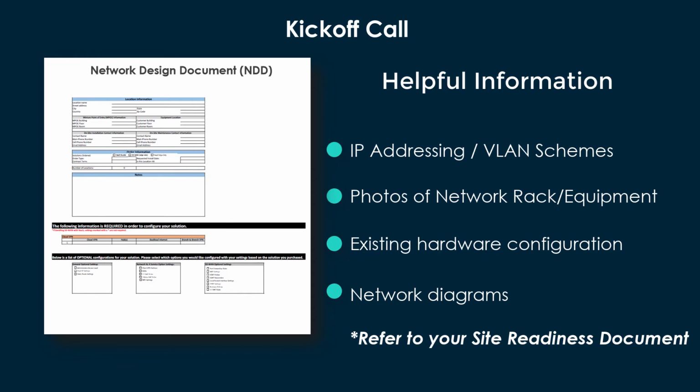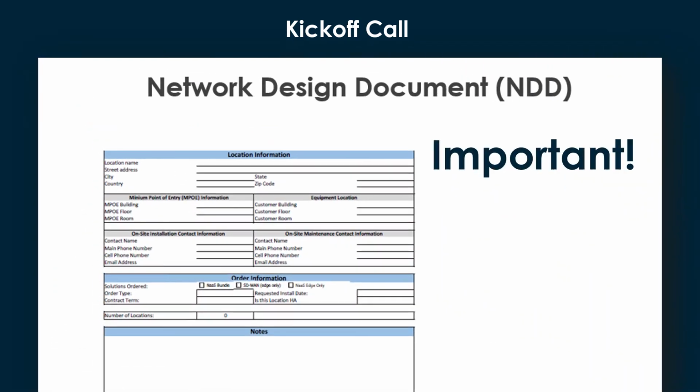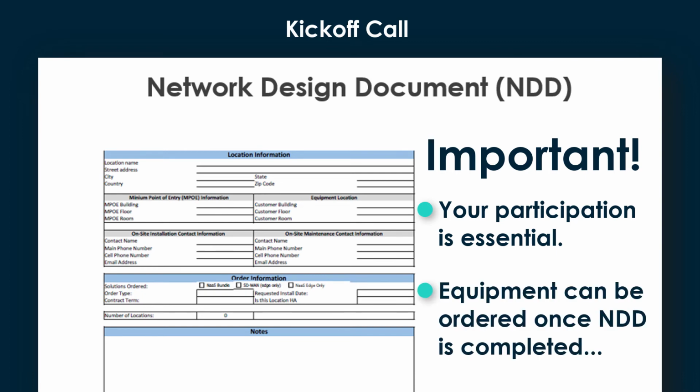You may not have this information, or you may be unsure of how you can gather it for the kickoff call. We'll be sure to discuss any information you are able to provide during the call, and your project manager will determine next steps. Because the NDD is relying on customer-provided information, your participation in completing this document is critical toward ensuring a smooth installation experience. Only when the NDD is completed can your CBTS project manager begin ordering your new equipment and move forward to the next phase of your installation.